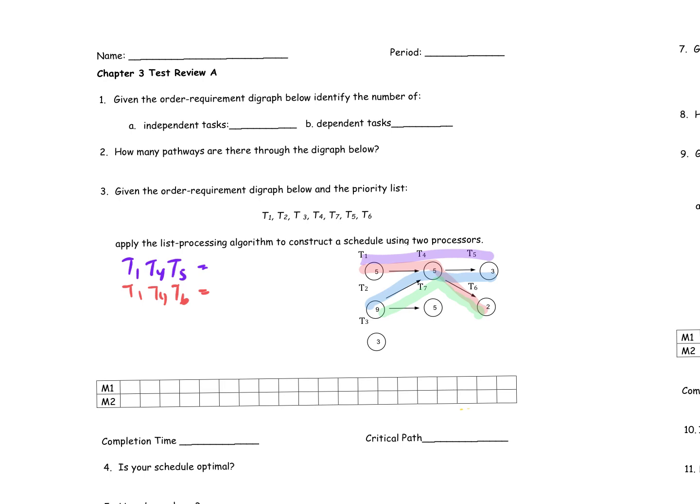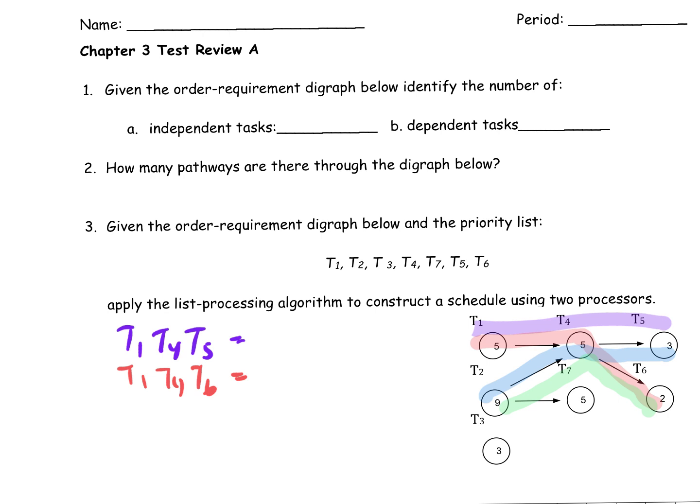This is number one right up front. When we talk about independent tasks, we also say ready task. Ready task is a little better description here. So I want you to look at this diagraph. How many ready tasks are there? You guys see there's three? A ready task is something I can put on the schedule right now.